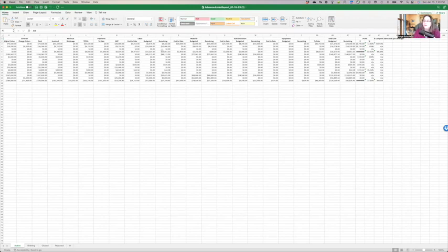We want to know how we can budget better in the future. And we also want to manage jobs as they're in progress and see if there are any change orders that we need to create because we're going over budget. We also may want to see where we're coming in well under budget and analyze why that may be. Maybe we well over budgeted something like labor. And those are good analytical tools to have. So we want to know how our jobs are performing against our original budget so that we can manage the jobs better and bid future jobs even better.